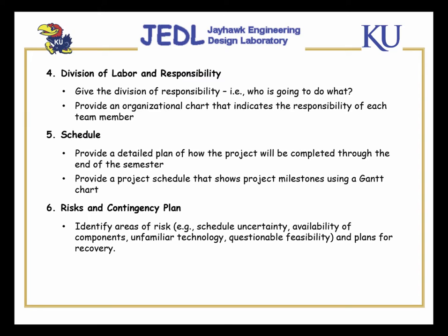And then I want a schedule. The schedule is a detailed plan in the report of how the project will be completed through the end of the semester. And you should provide a schedule that shows project milestones using a Gantt chart. Now, at this stage of the game, you don't have to have a lot of components on this Gantt chart. You should have an appropriate number of major milestones that you're going to meet.